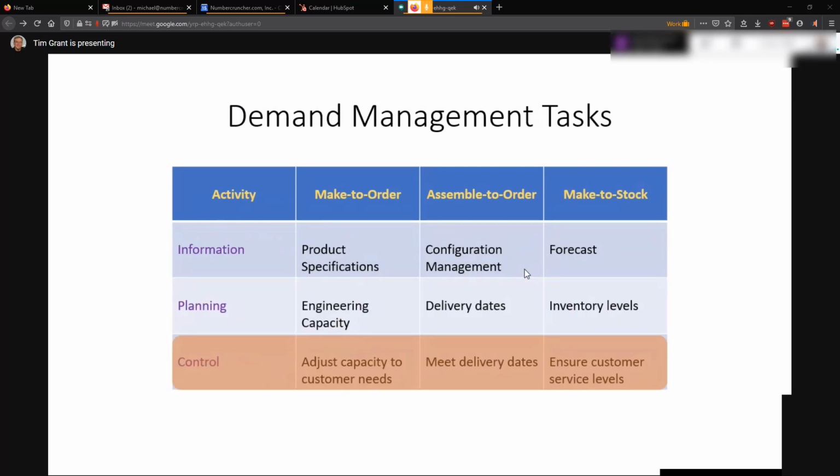Once a contract is signed or an agreement reached, the requirements are known in a make-to-order, or MTO, business. Managers can start scheduling the resources needed and production timetable. This is where lead times for purchasing and manufacturing are important and make or break meeting the customer deadline. Usually the costs are well known as they are established at the time of the quote. The project is only constrained by the capacity of engineering and the availability of resources, both in material and labor.